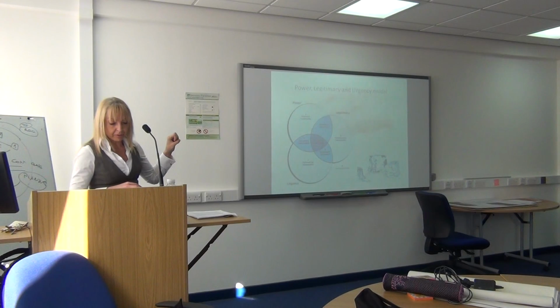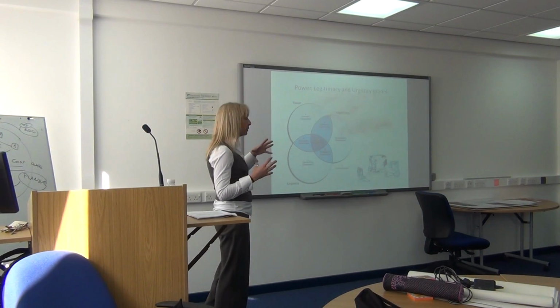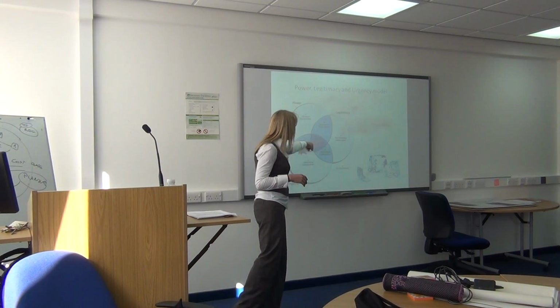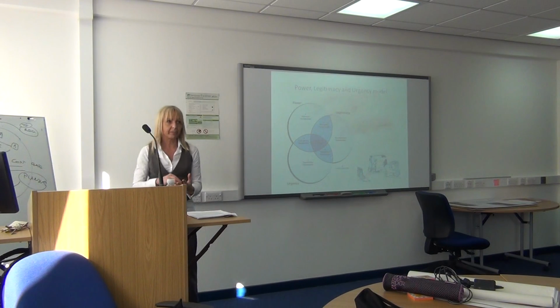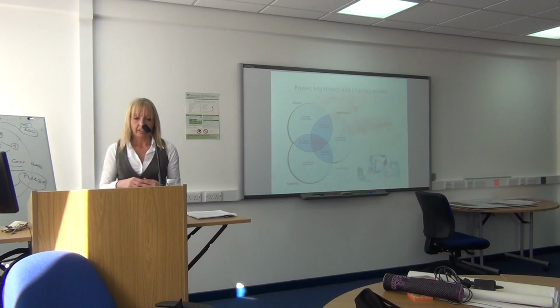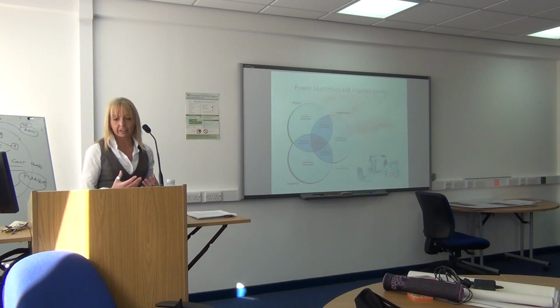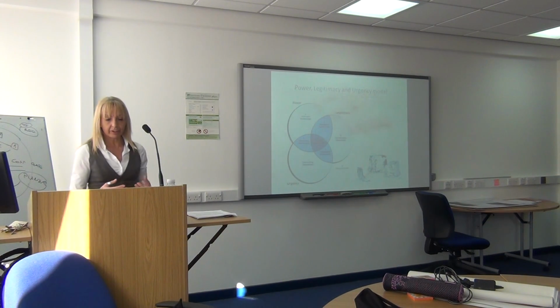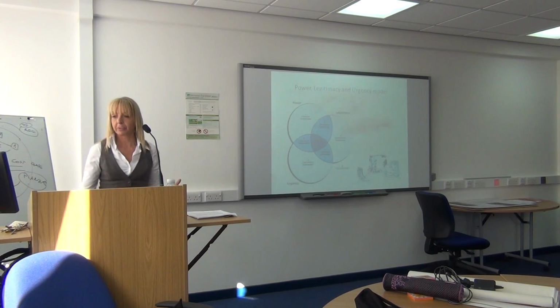So the most defined stakeholders within the project, or the most important stakeholders that you can then define, are these groups here, the definitive stakeholders. They have the legitimacy, the power and the urgency. So that's one way of plotting these people on the Venn diagram, rather than just through power, legitimacy and urgency.